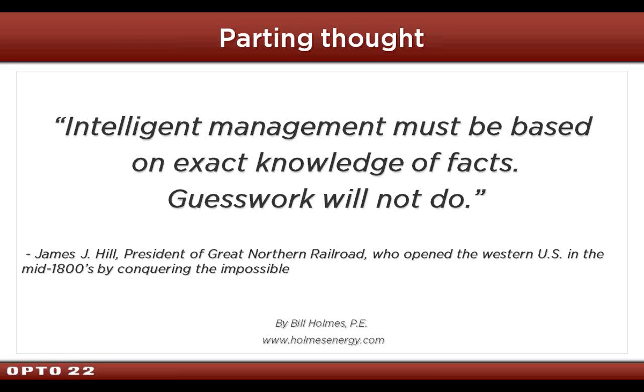So I think you touched on the last part of that too, shutting down continuous processes. It looks like you're speaking to that now. Yeah, and we worked with the owner and their contractor, and we worked with however they needed to do that, because all the plants we were in had times during the year when they were shut down for maintenance, even if it's only a week over Christmas, and that's when we worked and did it.